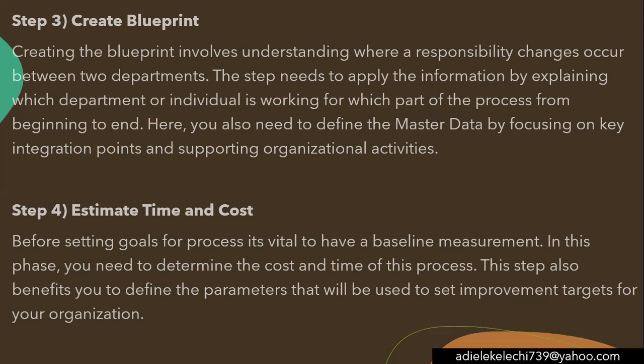So looking at the business blueprint, looking at the volume of work, you can actually sit with other consultants and, of course, with your project team lead and define. Looking at the scope, you can estimate the time, putting other factors together, and of course, the budget and the cost, direct cost and indirect cost for that project, cost of personnel, cost of consultants, hotel, movement, and all that.